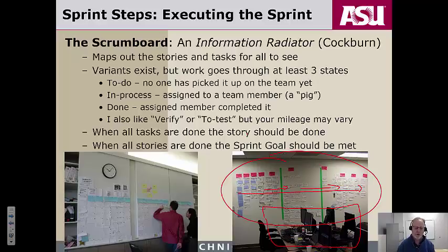And tasks, by the way, should be scoped to only be defined in hours-long format. In other words, as a developer, you should be able to move a few different tasks through these states per day. Certainly several per week. So it's very dynamic. If you take a snapshot every day of what the board looks like, it should increasingly look heavier on the right if you're maintaining your velocity.